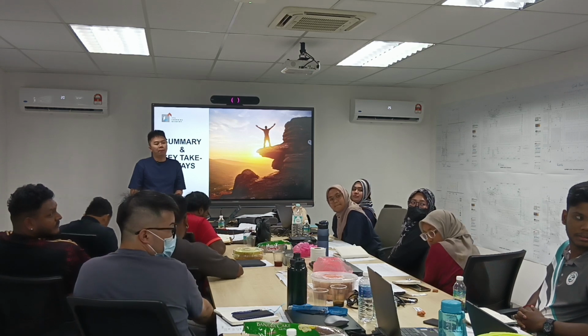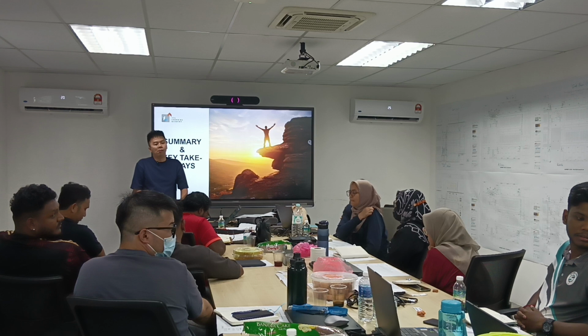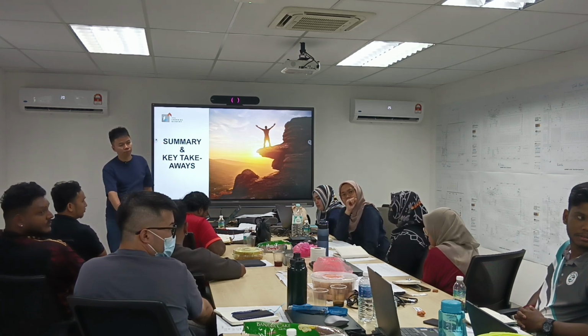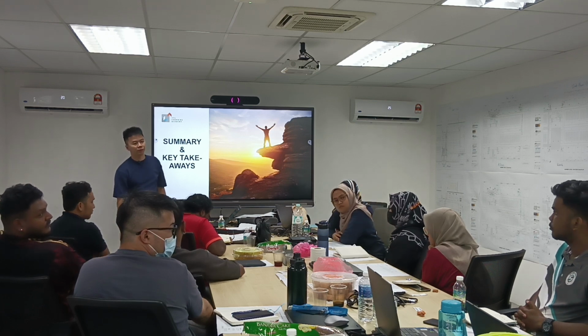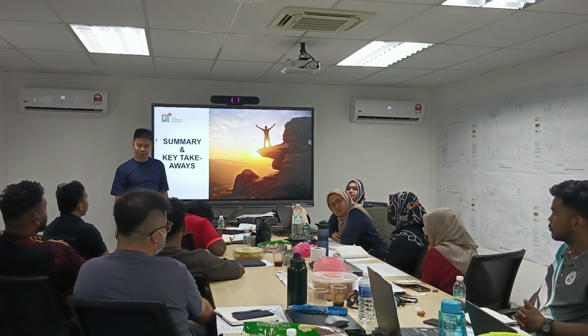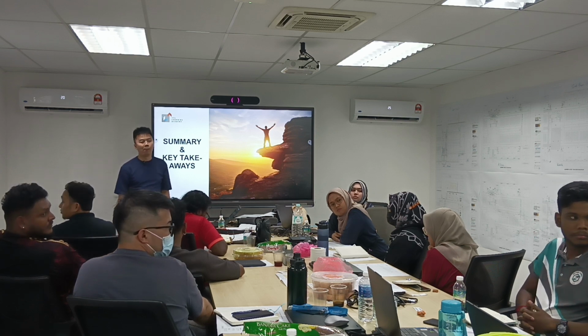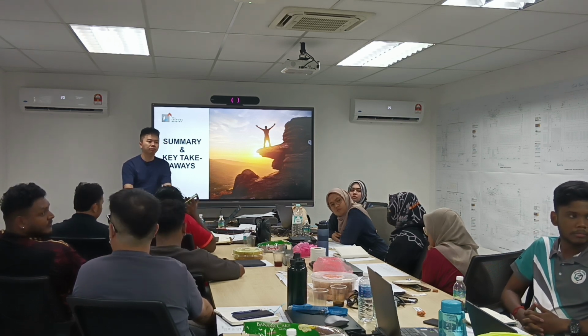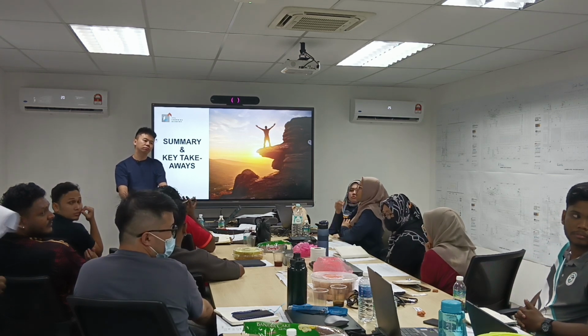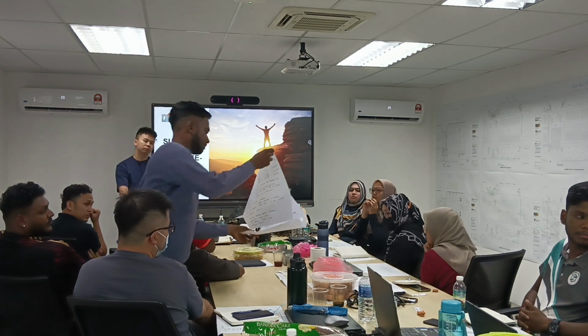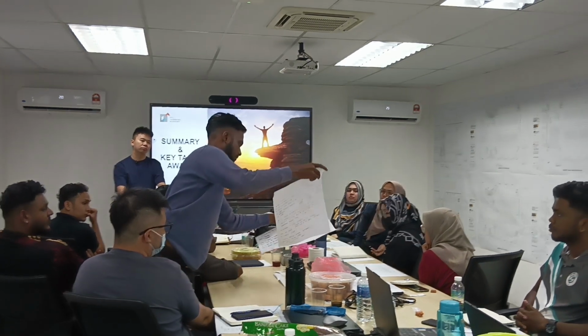After the issue for construction, the subcontractor produces the shop drawing. So let's say they already positioned the equipment. Then we go there, take the measurement, and the setting out is not according to the shop drawing. So let's say we have a tolerance around 50 mm. And then the on-site IOW wants to close the RFI, but the approved shop drawing is not up. So how are we going to tackle the problem?